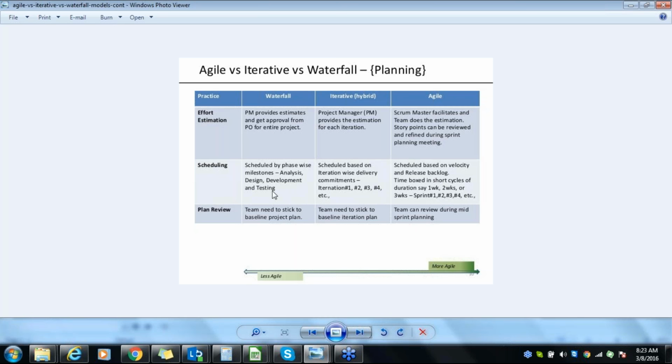But here you have to do it in tandem, and at the end of the day, suppose my development activity has been delayed. Till that time, the testers have to wait and sit idle. But in Agile there's little possibility of testers waiting for the requirement, because they can work on the next sprint. They will at least do the requirement analysis for the next sprint. That way, there's no wastage of time in the Agile methodology.